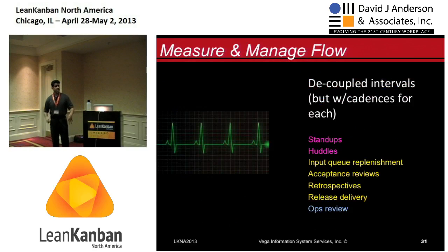And so along those lines, too, we also stopped believing that we had to have all our workflow activities end and start on these uniform fixed intervals. All right? Now, we still did acceptance reviews on these fixed uniform intervals because that was really a nice way to put on the calendars of our external stakeholders. They really liked that idea of meeting every 2 weeks, and we would show them that. But many of the other activities we stopped doing on a 2-week cycle, if you will, or whatever your interval is.